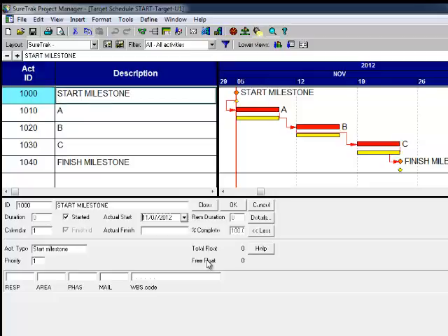How much work do you have left? If you started Wednesday, that means you worked all day Wednesday, all day Thursday, all day Friday. Yeah, but it's kind of rough, Larry, because there's so much mud. Even though we worked 3 days on a 5-day activity, we still need 3 more days. We need Monday, Tuesday, and Wednesday of next week.